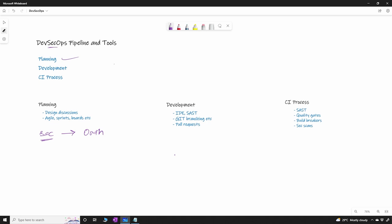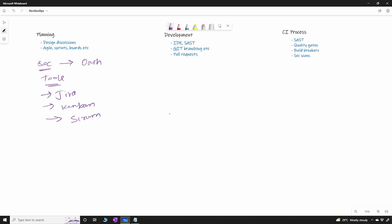During these discussions, typically these discussions happen over some tools and some of those tools are Jira is one famous tool that is used often during these discussions to create the stories or to create a simple Kanban board or to create a simple scrum board where you can use agile and all other stuff. So during this process teams will use these tools to collaborate between each other. So now let's say if a feature has to go to production, there will be a story that is going to be created which might be part of an epic and then story will have what functionality that is going by when.